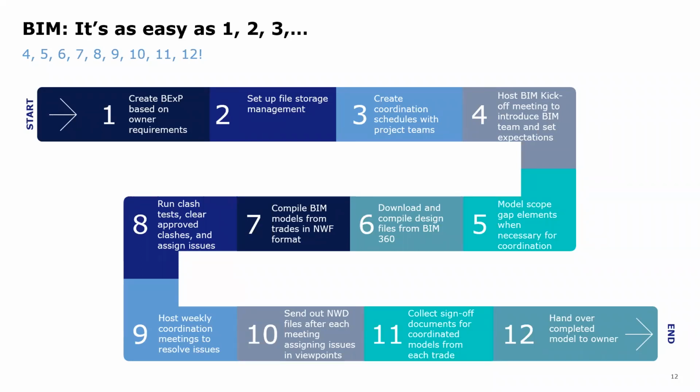We'll set up file storage management on Viewpoint, work with the architect to create that BIM execution plan, and then meet with project teams to create coordination schedules and set expectations. And we actually kick off our BIM meetings and lay out the schedule and tell them the LOD that's required.